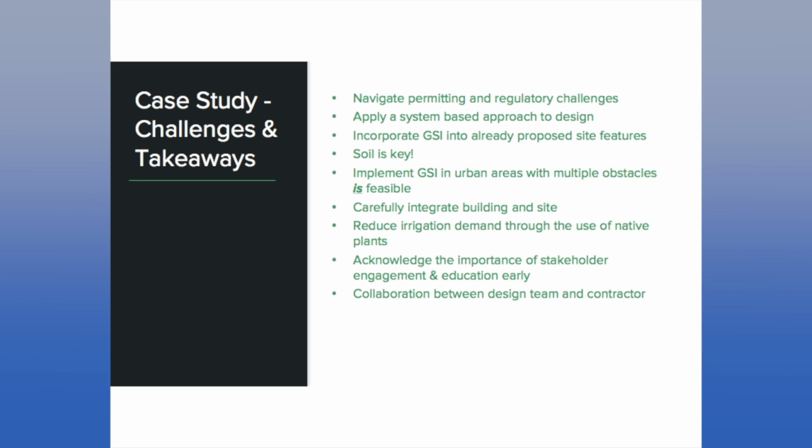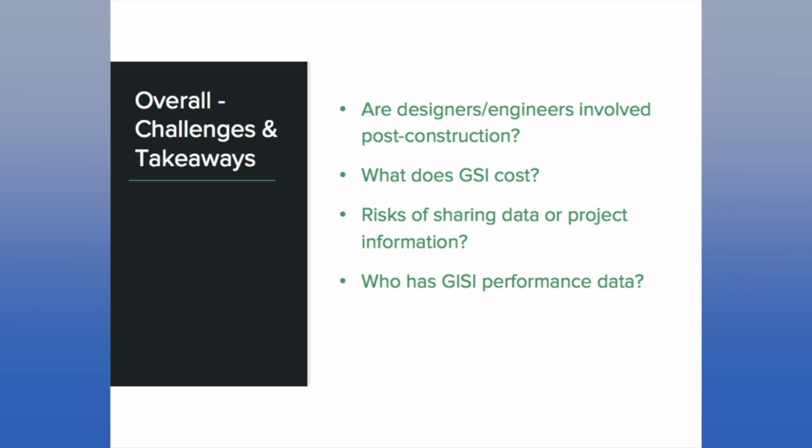And finally, collaboration between the design team and contractor. As an engineer, I feel like this is really important, but a lot of field changes happen. At the zoo, there was a potable water line that was feet away from where we thought it would be. It was on the survey here, it ended up being over there. If we weren't involved as engineers, who knows what they would have built. I guess the point is no one really would have known except for the contractors. So really engaging the design and engineering team into construction.